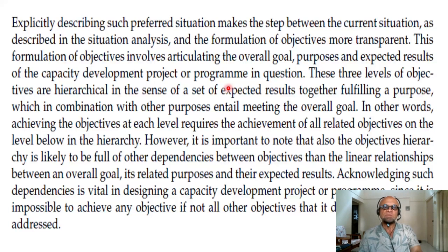This formulation of objectives involves articulating the overall goal, purposes, and expected results of the capacity development project or program in question. These three levels of objectives are hierarchical in the sense of a set of expected results together fulfilling a purpose, which in combination with other purposes entail meeting the overall goal. In other words, achieving the objectives at each level requires the achievement of all related objectives on the level below in the hierarchy.